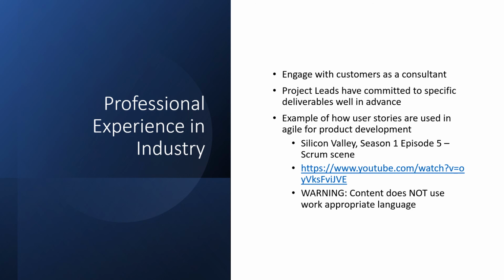The most significant difference is that all user stories are already documented once I am staffed. Developers rarely add user stories to the backlog. We spend a considerable amount of time clarifying requirements, but are discouraged from increasing scope. Also, there is rarely a product owner. Instead, there are project leads who have a strong relationship with the customer and who oversee all interactions with the stakeholders. Sprints are flexible, but certain aspects are rigid because of conflicting project milestones and deliverable deadlines.